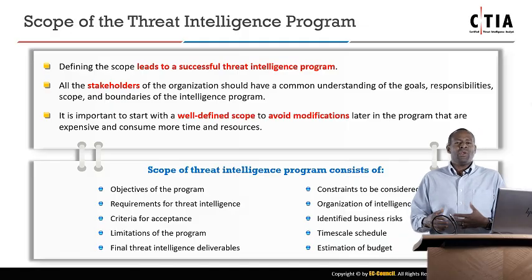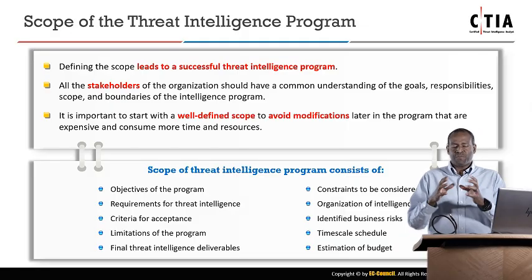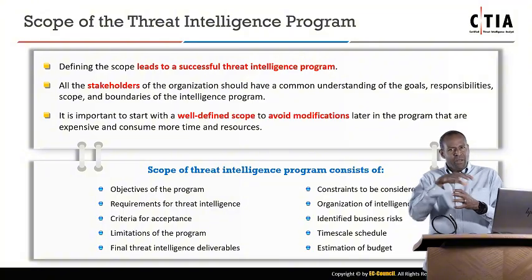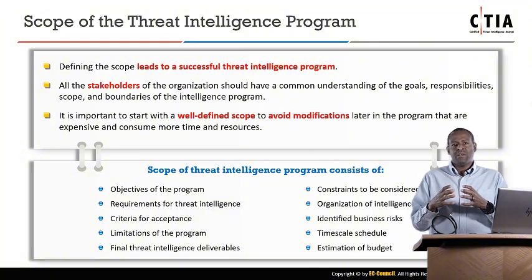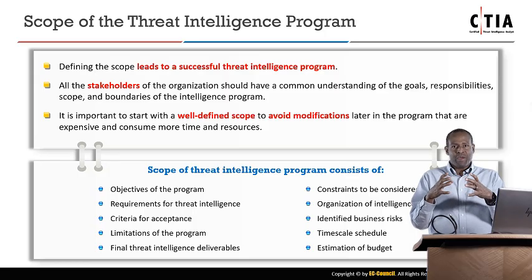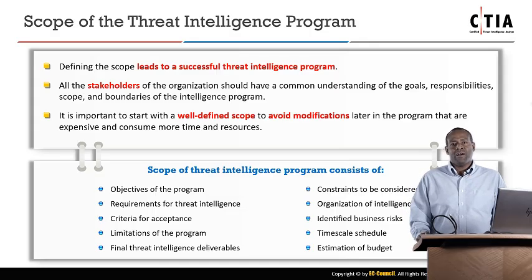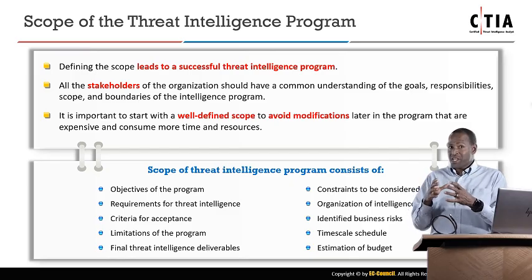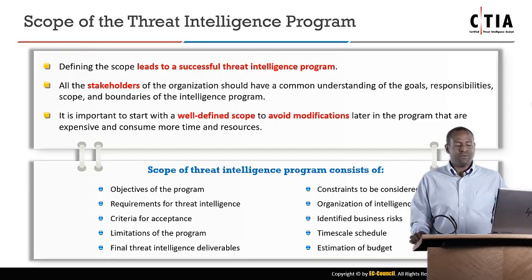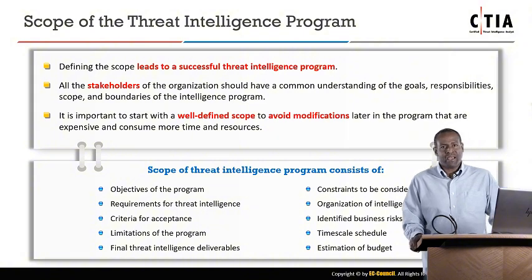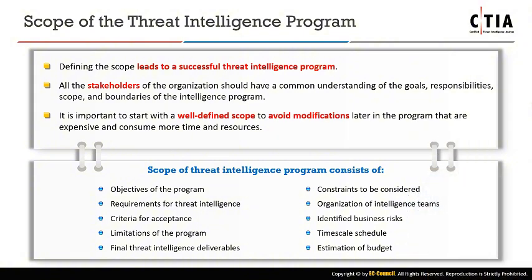In project management, what I want to do usually is put in built-in penalties for modification. So for instance, if this specific type of scope creep happens, then that automatically triggers a budgetary upgrade or update. And that would make it so that the organization really doesn't want to increase that scope. So it's very important to get that scope well defined.